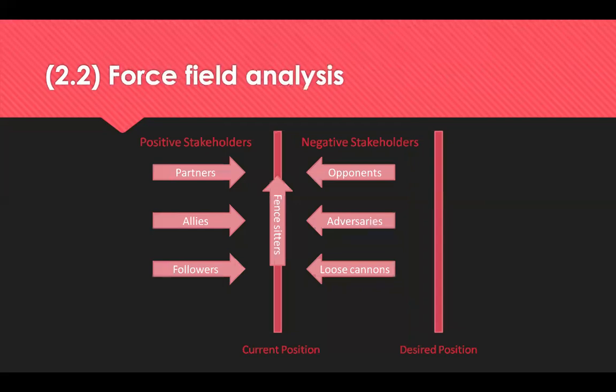Now, force field analysis was developed by Kurt Lewin in 1951. Now, this is a widely used tool to inform decision making, particularly with regards to managing change. It's a method you can use to gain a comprehensive overview and assess the sources and strengths of all the different forces that are acting on a potential organisational issue or change. And the idea behind this force field analysis is that situations are maintained by an equilibrium between the forces that drive change and others that resist it. So for change to happen, the driving force must be stronger than the resisting force.